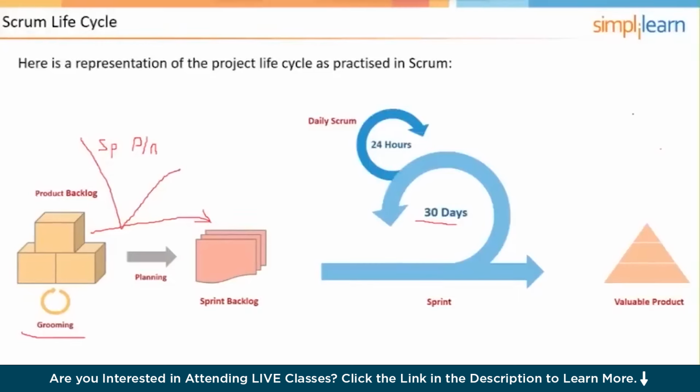There will be a daily scrum, like we did at the beginning of our workday together as our team. And then at the end of the work of the sprint, there will be the sprint review. The sprint review meeting or ceremony is also time-boxed, and it is time-boxed to 1 hour for each week of the sprint.